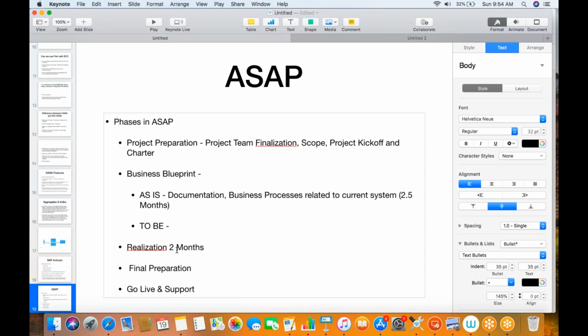So at this point, the user is not involved at all. And that is where the surprises come in the final preparation. When they go for UAT, now let's assume out of this 1 year of project, the UAT is only coming after 7 months, right? We are left with only 5 months now, and there are a lot of surprises in UAT.